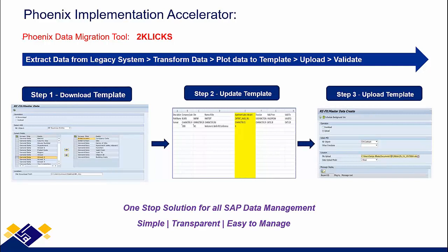This 2Clicks is our in-house built software package, I would say. This is basically to handle all your migration. So you have your leases, you may be having 500, 1,000, 2,000 active leases. We need to migrate them quickly into the REFX or CLM module, and migration takes a long time. We generally spend about 30 to 40% of the project time on just the migration activities, developing in-house programs to upload the data into the SAP system.